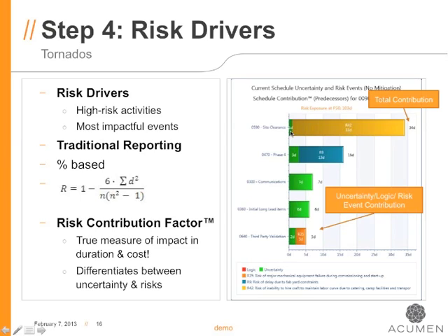It's about a day. What's hurting site clearance is risk 42, which is the risk of inability to hire craft to maintain labor curve. So again, it's a much more insightful way of pinpointing risk drivers, because now instead of trying to home in on the duration on site clearance, we know that we actually need to home in on the mitigation plan that we put aside or that we planned for that risk 42.